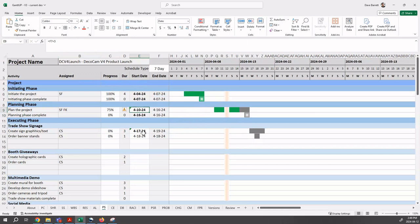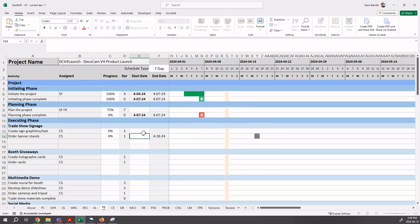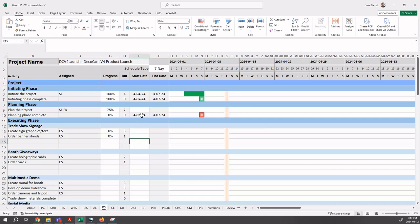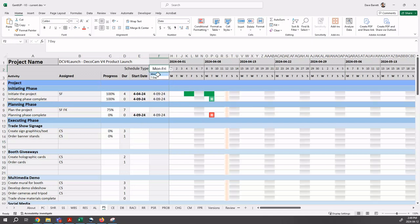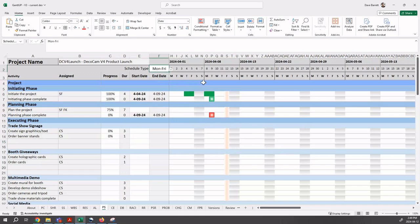I'm just going to take out the dates again. Now there are other schedules where it's not appropriate to schedule time on the weekends. A lot of business projects, you don't do work normally on the weekends. You have Monday to Friday. So in this case, once I did this, the weekends are grayed out. That means work is not to be scheduled there. And you can see that the four days here is Thursday, Friday, and then it skips over the weekend, and then it's Monday, Tuesday.